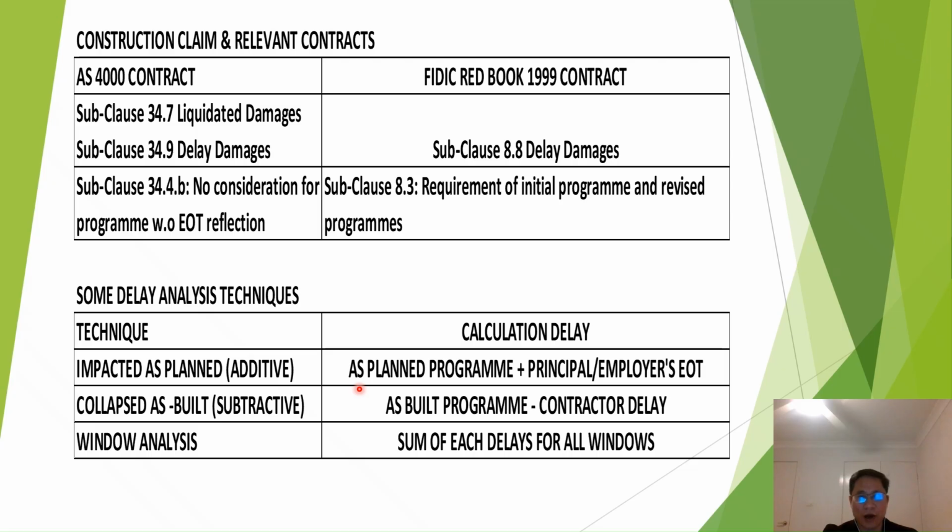The theory of this technique is that the completion date will be based on the as-planned program, that's the baseline program that the contractor submitted to the principal from the beginning of the contract, plus the employer's EOT will be the completion date for a project.